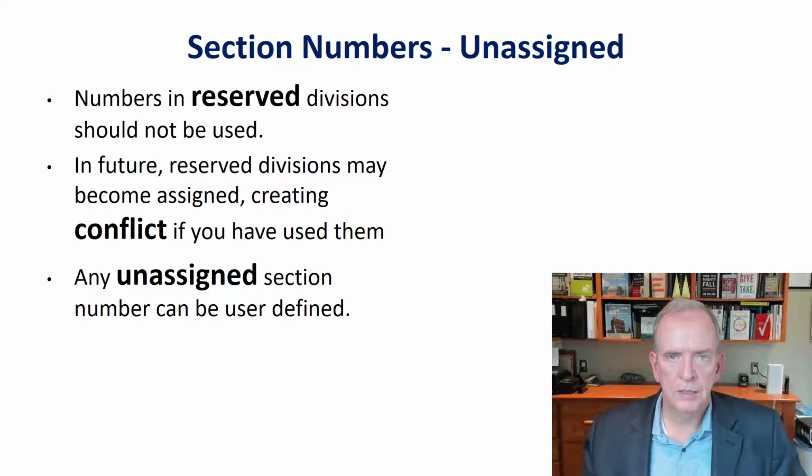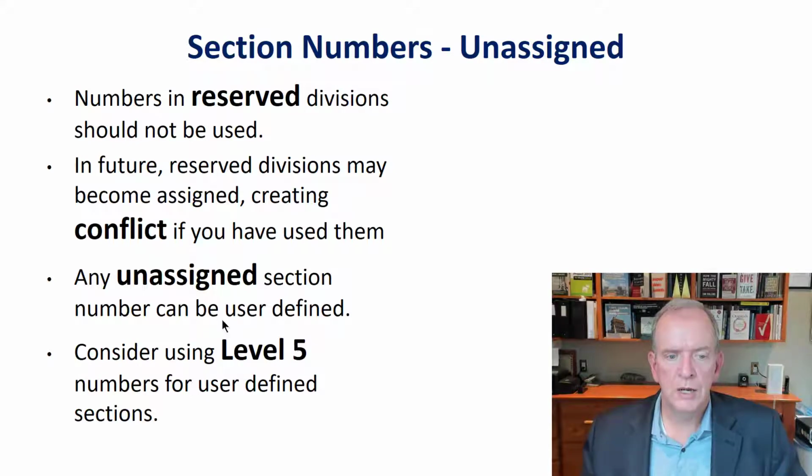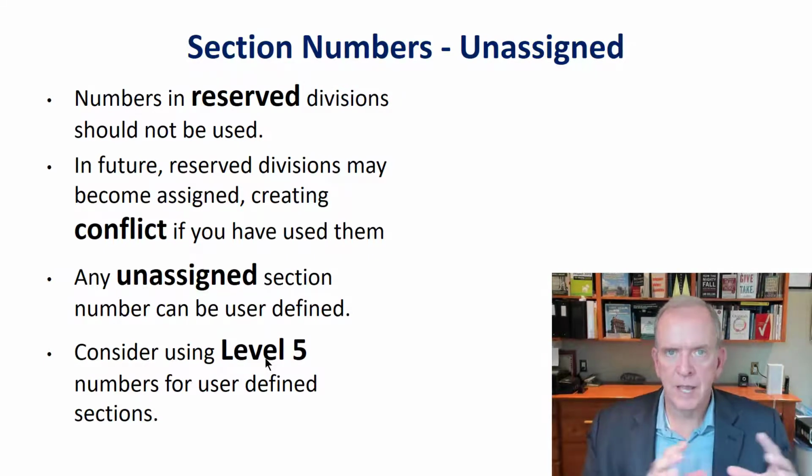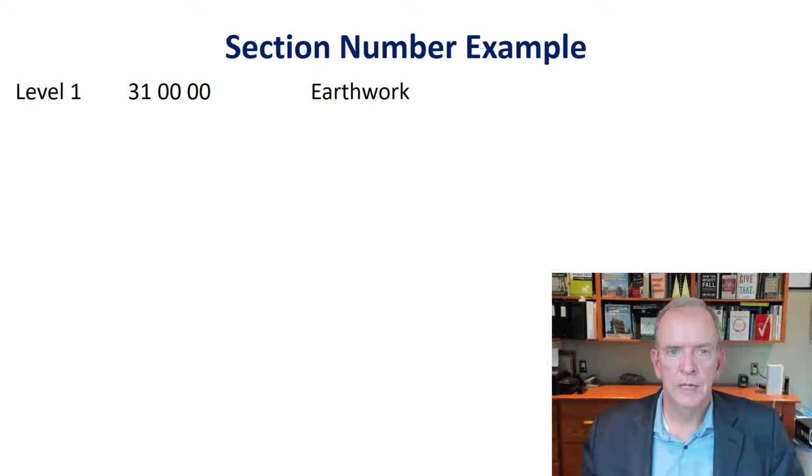Typically, things that are out there now have their appropriate location, and if it's something really detailed that there's nothing to reference, that's what level 5 is, the last one. So typically it's going to go to level 3, level 4, but if there's something that doesn't seem to fit, it must have a category that would make sense, and then that would come under level 5, detail.